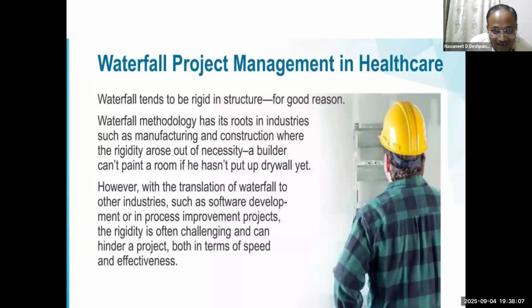So it looks to be too rigid. Waterfall tends to be too rigid in structure, as we know, for a good reason. The waterfall methodology has its roots in industries such as manufacturing and construction. Earlier, the civil construction people and workers started adopting this waterfall approach mainly out of necessity. For instance, a builder can't paint a room if he hasn't put up a drywall. And once you have a drywall, until you have 1 or 2 days meant for that, you cannot go in for painting. So it is with this kind of agenda that unless the specific event previously has been completed, the next event cannot be taken up.